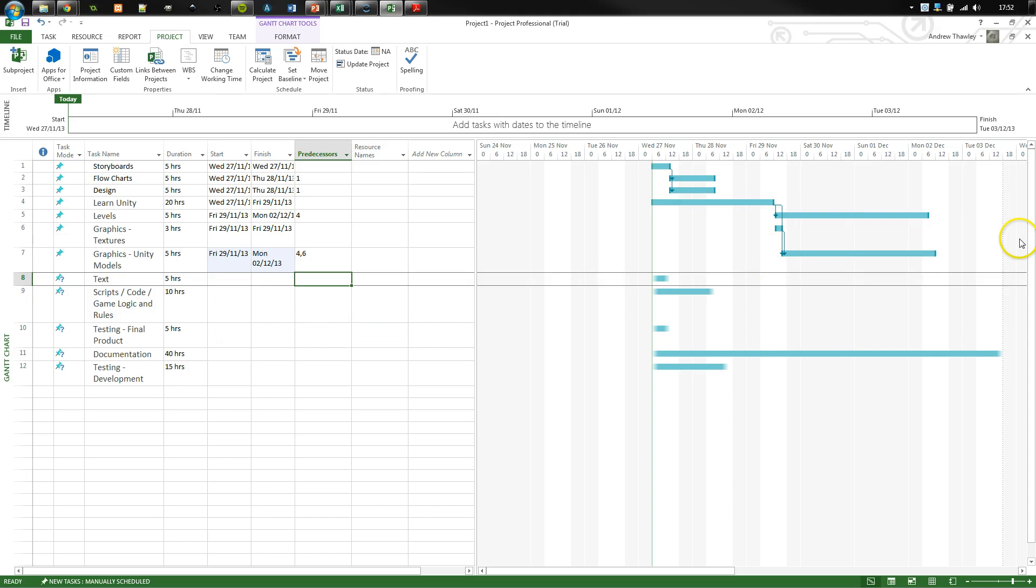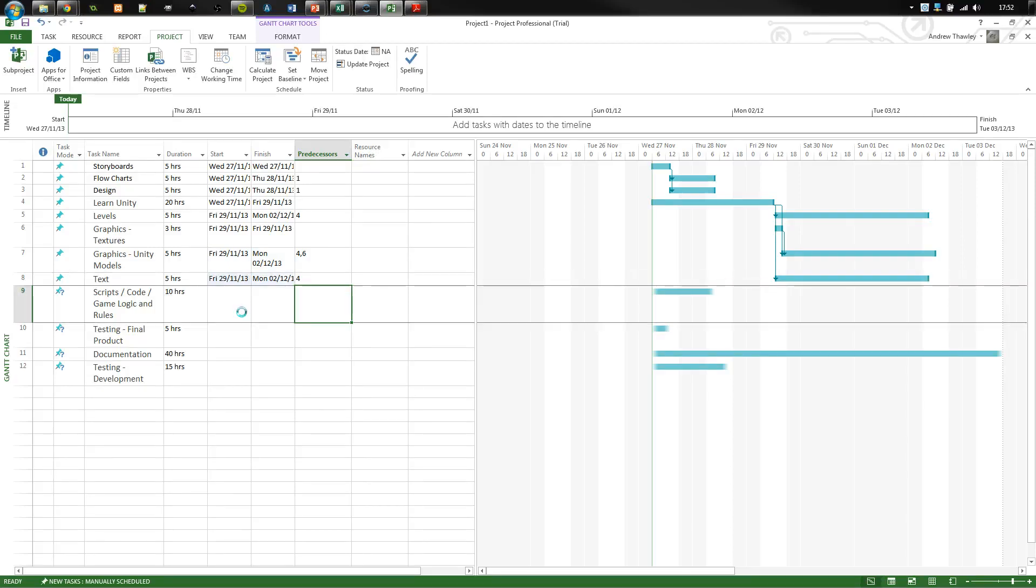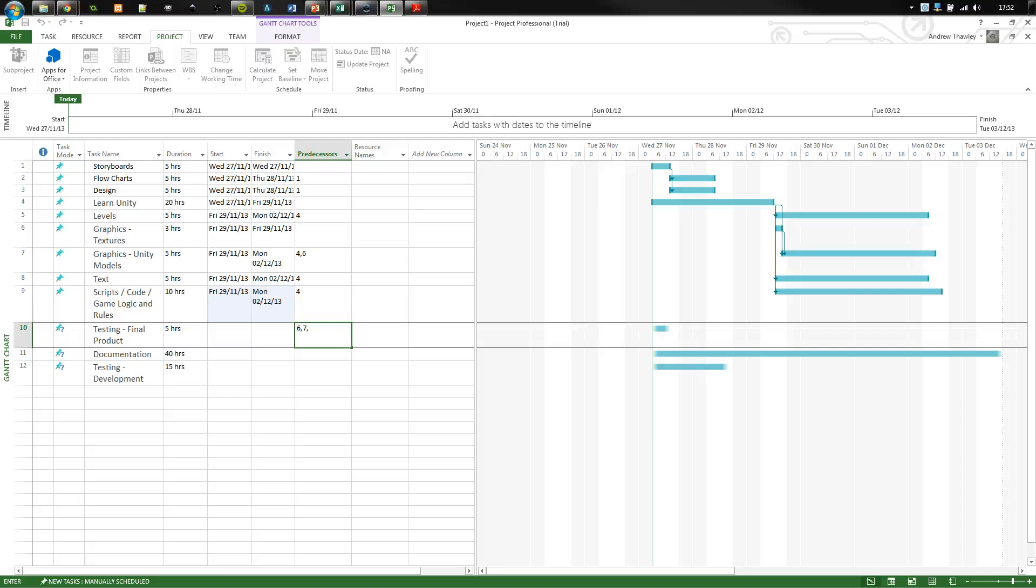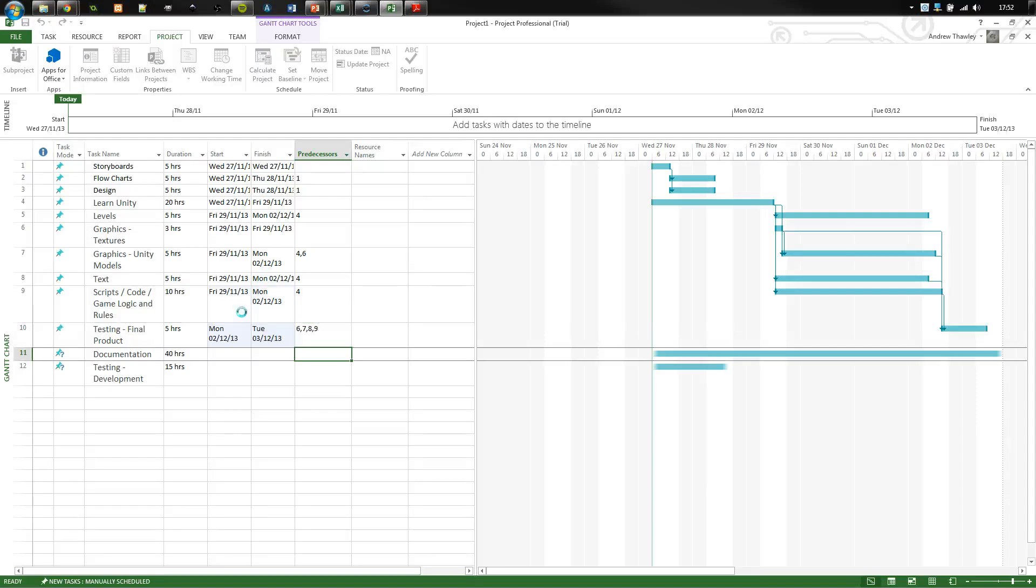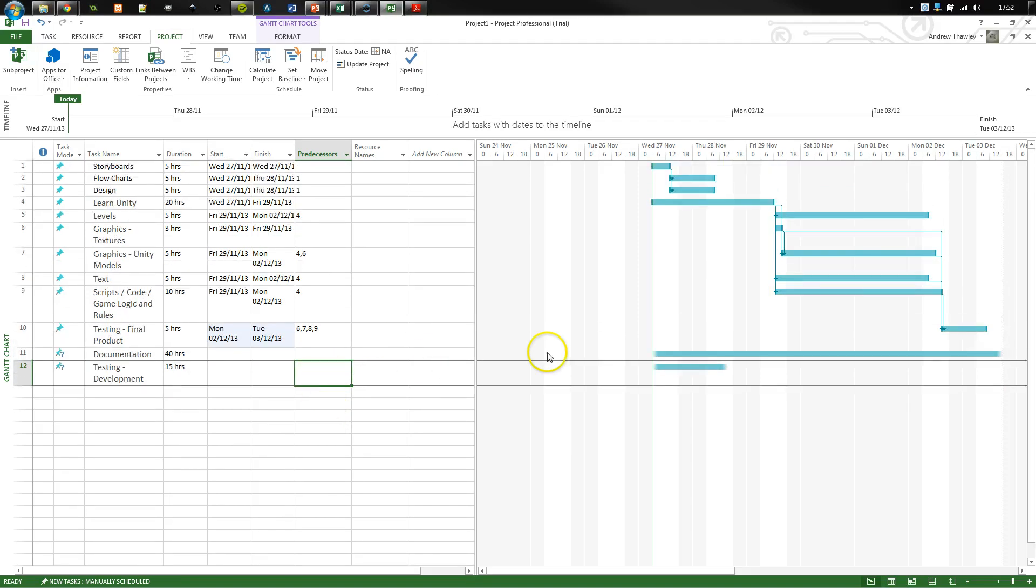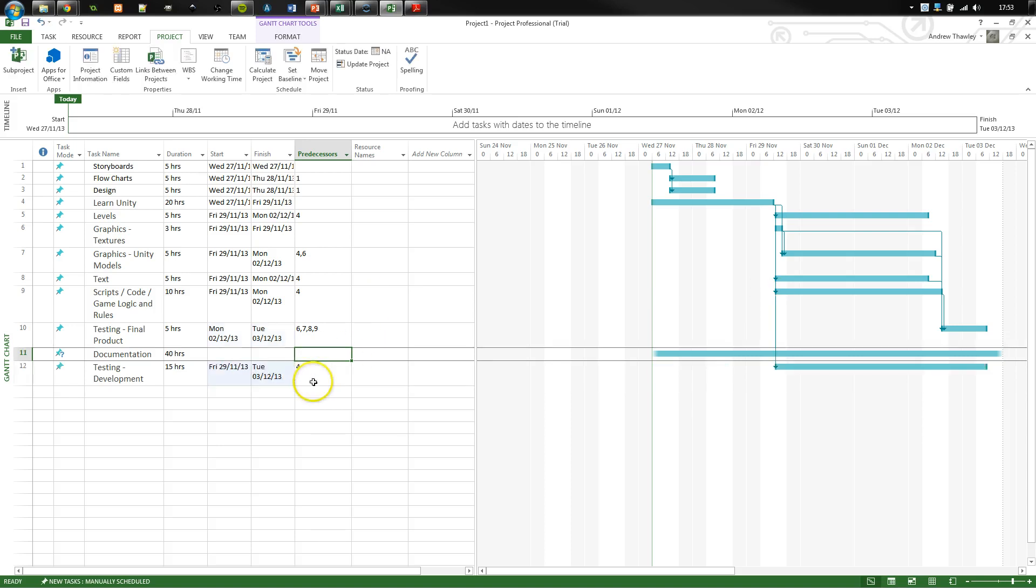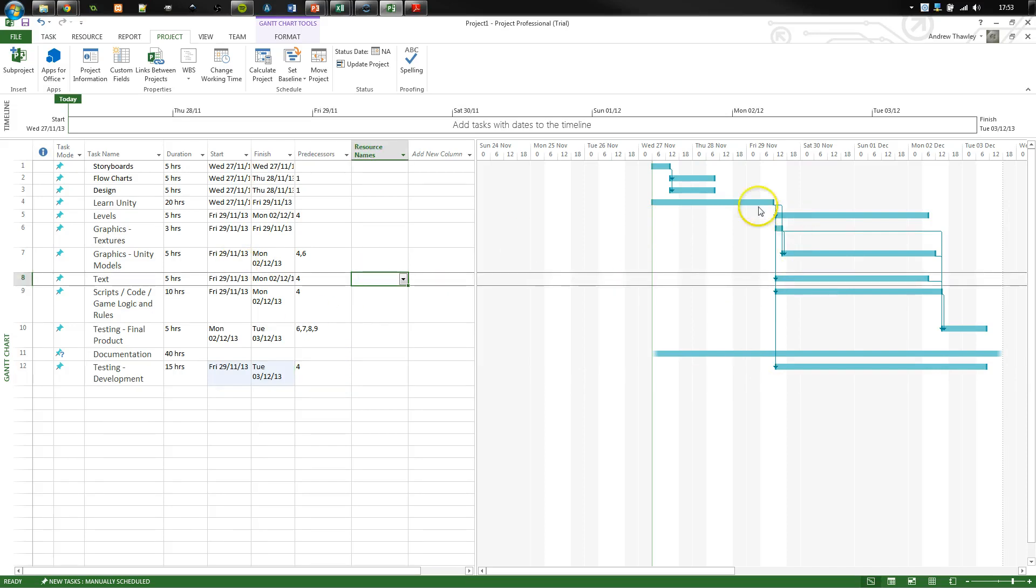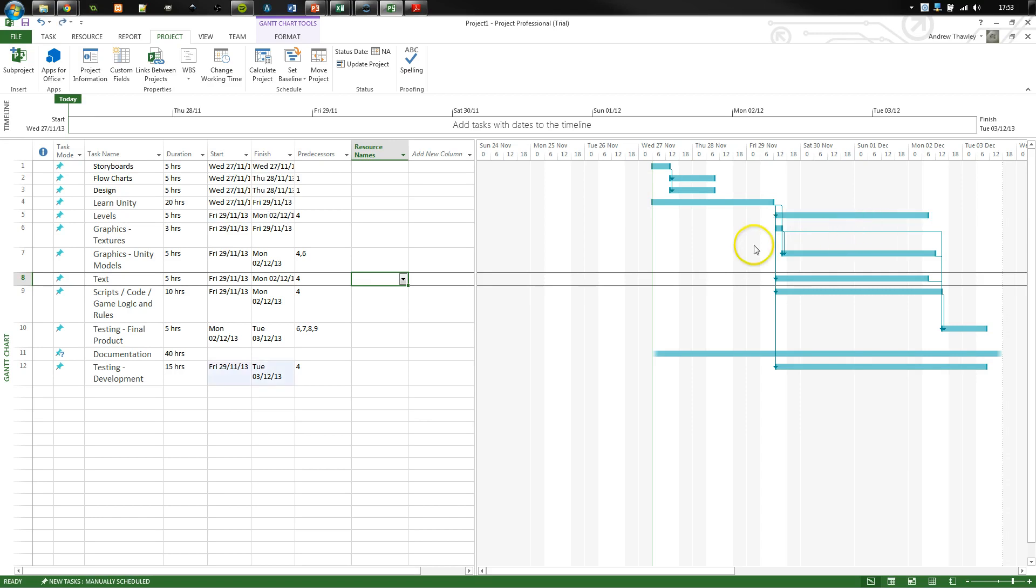So it's already automatically moving these along, unlike Excel where you've got to do all this manually. So it's very good for scheduling out your time. So that was fine. Now for testing, this is what I need to have finished first. I need to have my graphics, I need to have the Unity models, I need to have the text and the game code finished. For documentation, I can do that all the time. And my testing and development is happening at the same time as I'm building the product. So it's automatically gone and built in all of our times that we can actually work on the project. I can manually drag these around and move them if I need to, but I'm not going to worry about that.